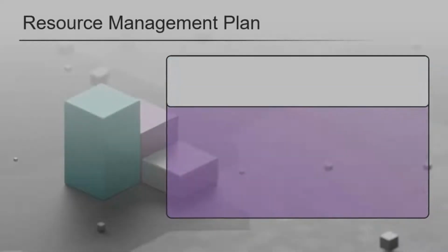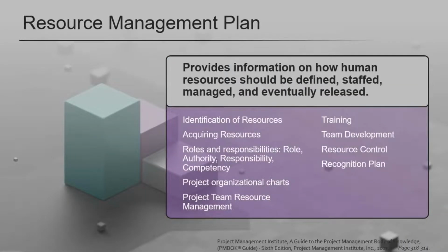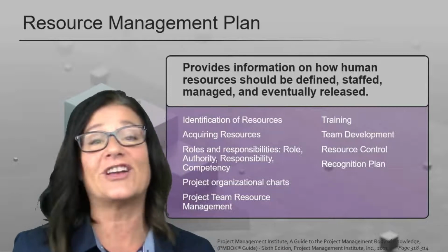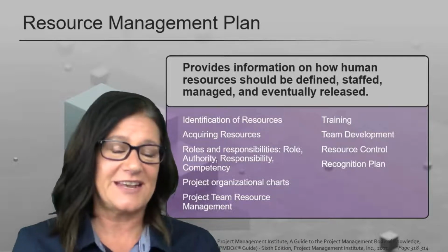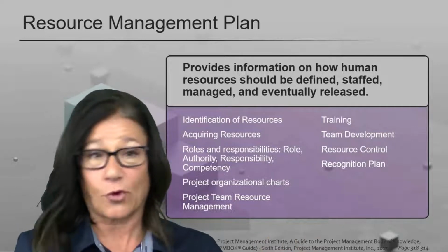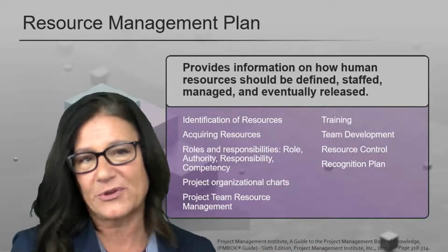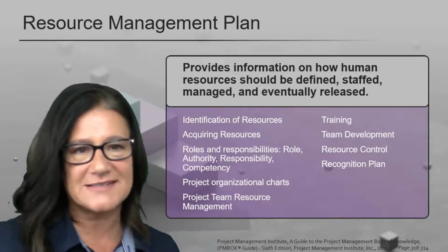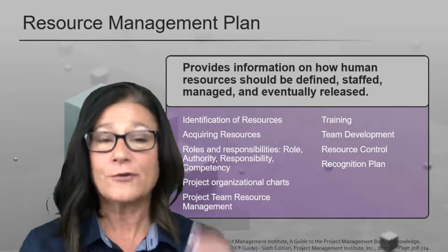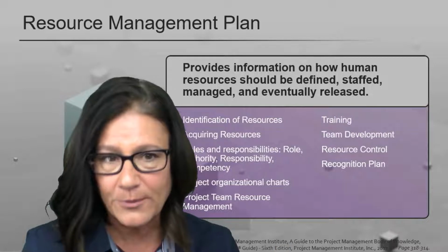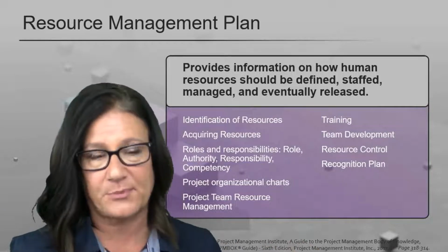All right, so that brings us to the resource management plan. Anytime you see management plan, if you look at that chart that I gave you, you'll see a lot of them. And basically, it falls under every single planning process. Plan scope management plan, requirements management plan, schedule management. These are all the how-to guides. These are the rules of engagement for each one of those knowledge areas. If you don't do procurement, you don't need a procurement management plan.